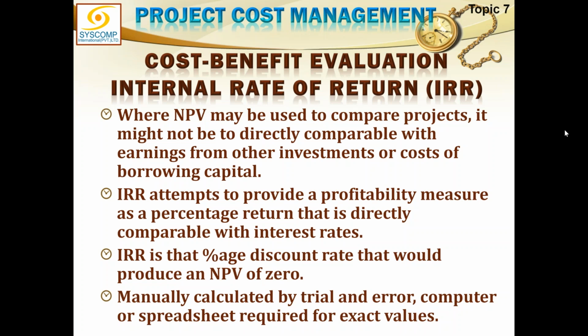If I calculate my project, which has absolutely nothing to do with a bank, bank is a different business, my business is a different business, but still, I just want to see the money I'm investing in this initiative. Should I invest it in this project, or should I keep that money in the bank? Because if bank is giving me more profit, then probably I should not be investing in a project. Project has to be feasible. Project has to break even. Only then I will invest in the project. Otherwise, it is better to put the money in bank.